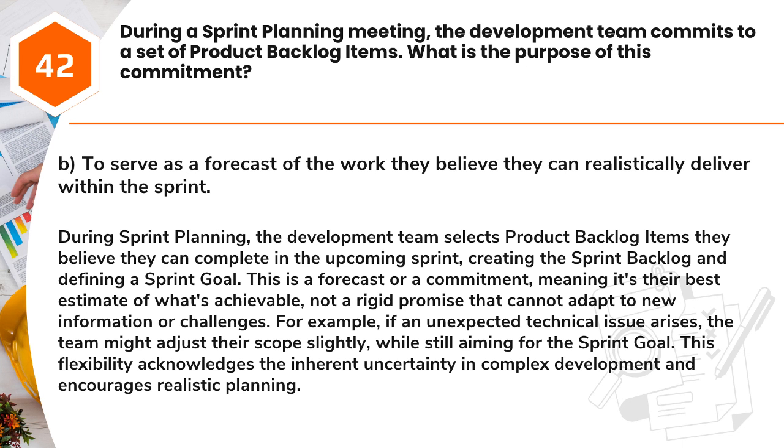Answer: B. To serve as a forecast of the work they believe they can realistically deliver within the sprint. During sprint planning, the development team selects product backlog items they believe they can complete in the upcoming sprint, creating the sprint backlog and defining a sprint goal.